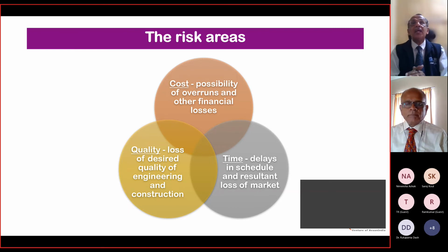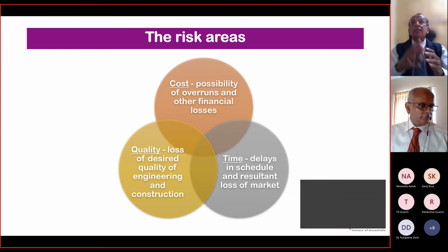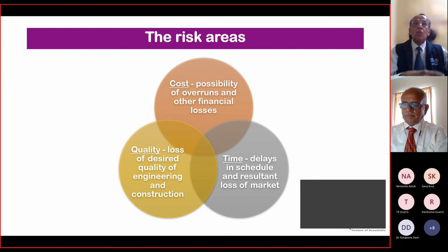So what we are trying to say is that once you deploy an international inspector to supervise the quality aspects, you can be 100% sure. Yes, we have paid extra money for it, but we have an internationally accredited chartered engineer who has visualized the entire process and certifies it. So this is how quality can be assured. At the same time, this is at the port of loading. Like what Shyam has already said, it can happen at the site of destination as well.